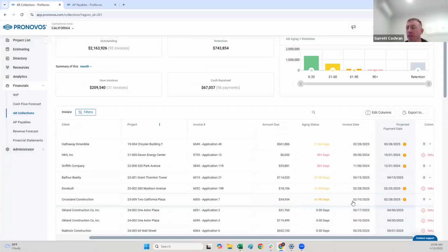Do you see an upside to maybe giving yourself a little bit better cushion on that date? Like we said, 78.5, maybe going to 90, or where are the upsides and downsides of that? Yeah, I think you obviously always want to be the most realistic, but if you're going to be cautious one way or the other, it's probably better to be conservative than aggressive. Because what we see a lot is really what you care about is managing your cash flow.